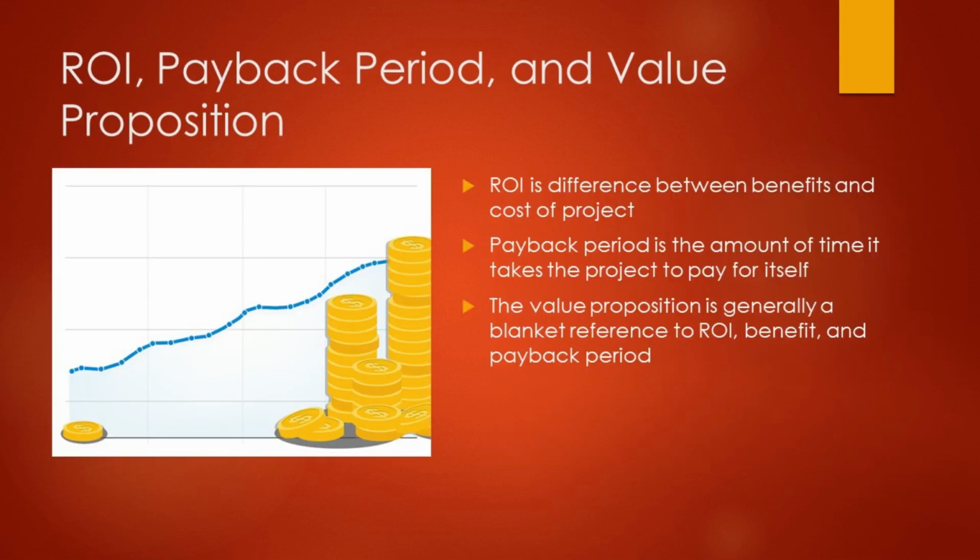Return on investment, payback period, and value proposition. The return on investment can be generated by taking the dollar amount associated with the benefits of completing the project minus the cost of completing the project. You can also use that same information to generate the payback period associated with the project, which is how long it takes the project to effectively pay for itself. All of this information makes up the overall value proposition with completing a specific project. This is the information that decision makers will ultimately look at to determine whether it makes sense to do this project instead of other projects in the pipeline.